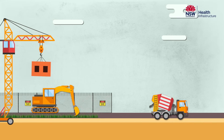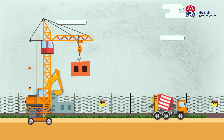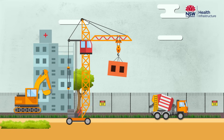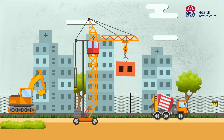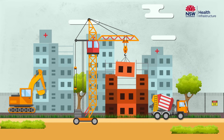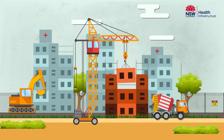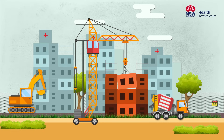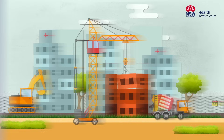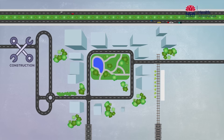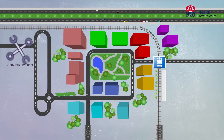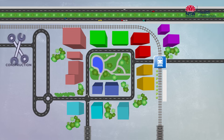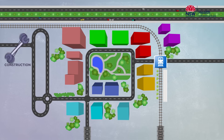Construction involves enabling work such as installing site fences and site offices, early works such as demolition and installation of in-ground services, main works which includes building the structure and installing major furniture, fixtures and equipment, and refurbishments of facilities such as repurposing existing facilities for an alternative use. Construction is often divided into different stages so our works have minimal disruption to patients and staff, with priority always given to providing clinical services over construction.